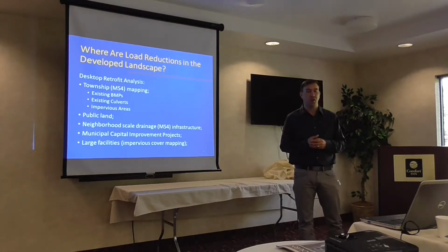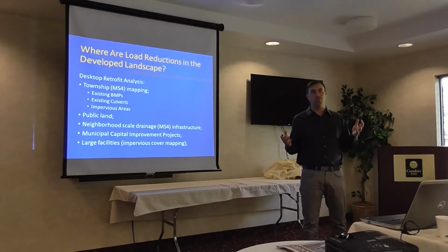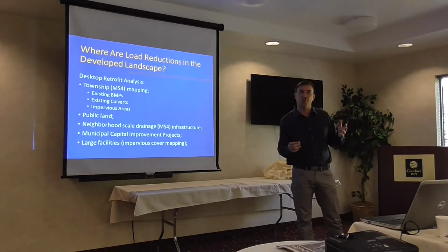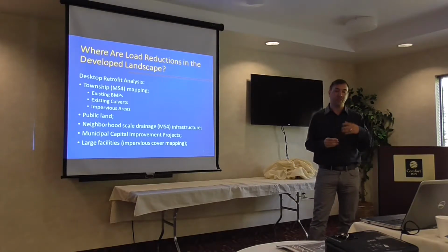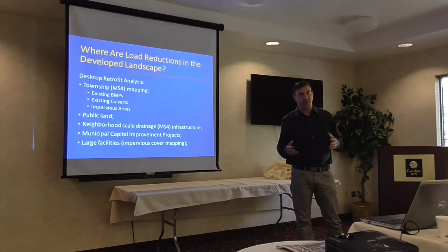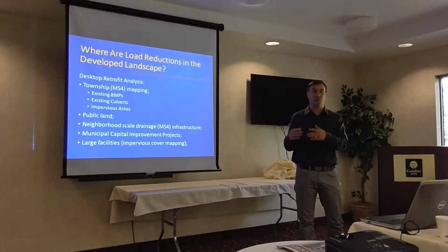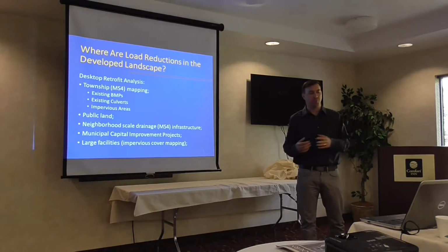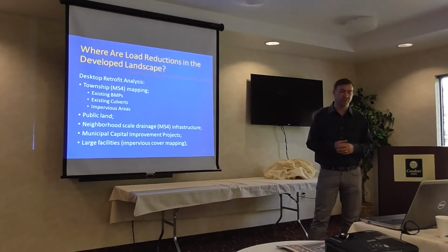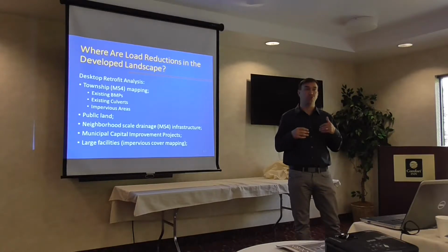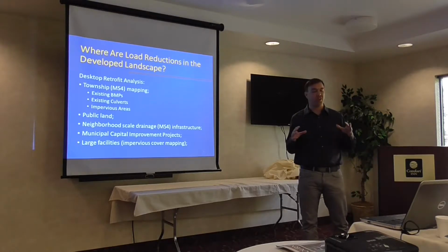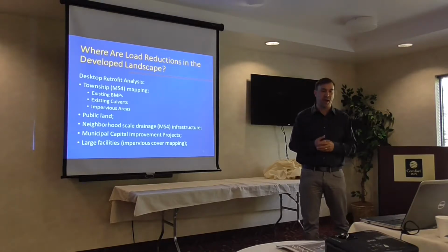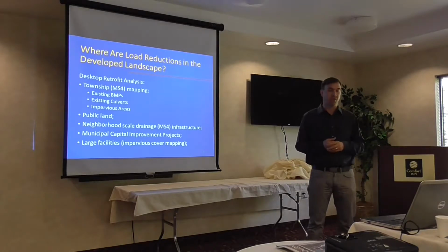Typically, and this was the approach that we took here when we did some of the retrofit inventory for the TMDL, you look at public land. That's land that you own, you maintain, you already have some level of control over, so you can have some confidence that you're going to be able to implement that project. That's not to say that you can't look at private land. It just means obviously you need to engage that landowner and work with that landowner over time. And that may produce some hurdles and some issues as you go through the design and implementation process. But typically if it's your land, you have a lot of control over that, and you can sort of dictate when and how fast things are going to happen with a little bit more confidence.